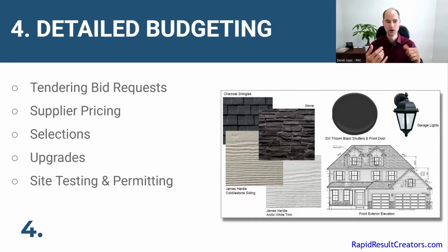Site testing and permitting. So during this detailed budgeting stage, the design should be at a place where you can send it out for permitting. And then also you want to do any site testing. So if you need to do any testing for geological or maybe asbestos or whatever it may be, you want to get that done during this phase so that you know what it's going to cost if there are issues that come up.